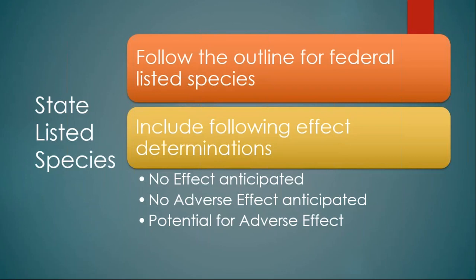And I also want to identify, as you remember, I talked about state listed plants. In the scenario for state listed plants, if they're in your project area, the department notifies the Florida Department of Agriculture and Consumer Services, FDACS, and the Endangered Plant Advisory Council when bids for construction projects are first advertised. And this is required under Chapter 5B-40 of the Florida Administrative Code.